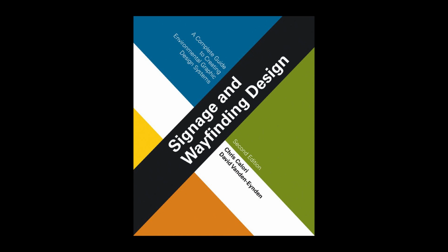Conversely, the designers shouldn't be unreasonably fussy, for example, objecting to fabrication details that don't compromise the appearance or functionality of the design intent. That said, the designer should review submittals very carefully, for once a submittal is approved, it is considered an acceptable standard for fulfillment of the fabrication contract.